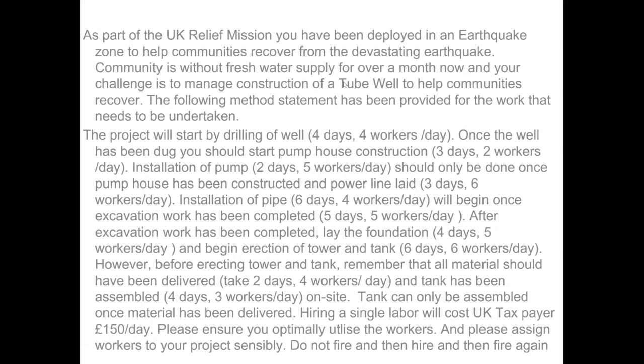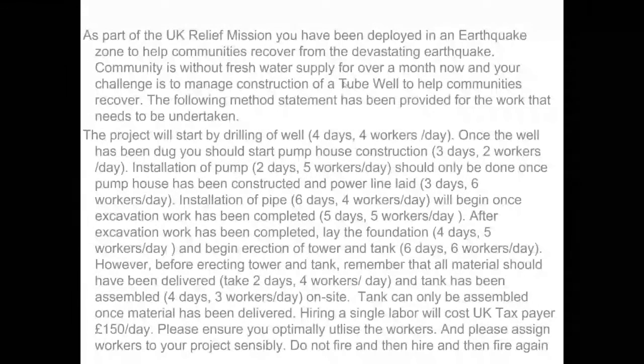If you want, you could use maybe Microsoft Project or a scheduling tool of your choice. Then you would identify the bar chart. Once you have the bar chart, then you will load this bar chart with the resources required. And once you have the resources, you would have some sort of resource aggregation, and you will see what your resource profile looks like.